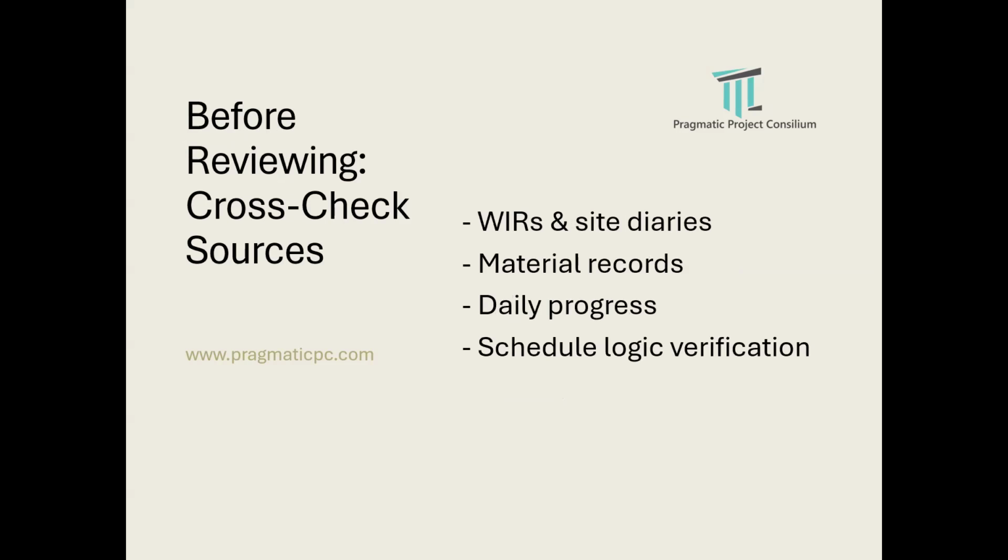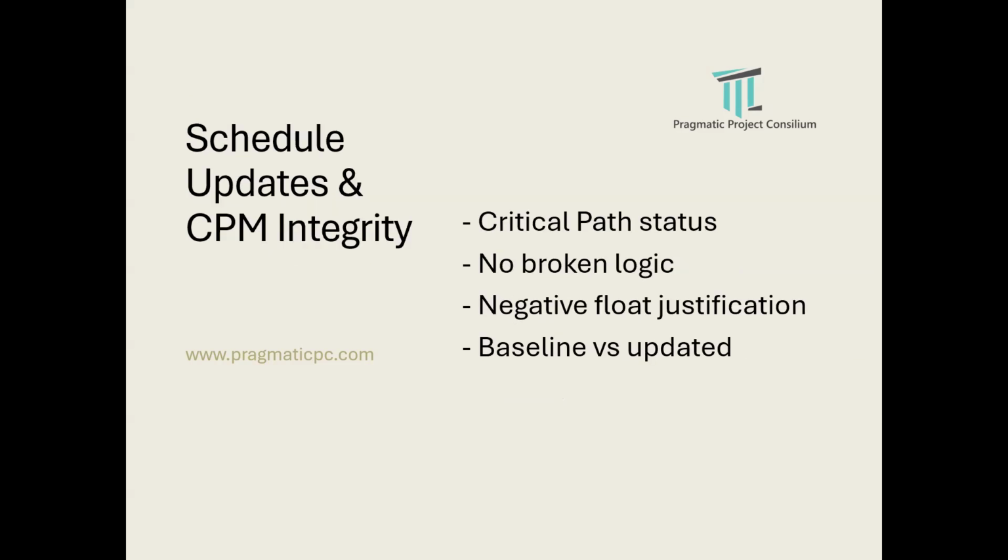So how should we cross-check the data, like weekly information reports, site diaries, material records, daily progress reports, schedule logic verification. Everything has to be done to check whether the monthly progress report is properly being prepared.